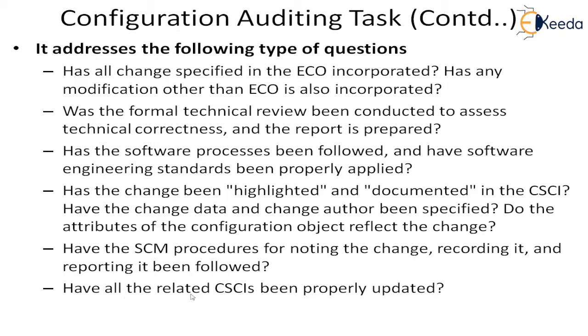And finally, have all the related SCIs, CSCI, that is computer software configuration items, been properly updated, whether, when they have been taken into the repository, it is correctly updated or not. So these are the kind of questions. If you can create a checklist like this, a questionnaire checklist, then you can say, yes, this has been done, this has been done, this has been correctly noted. Like that you can see. So all this kind of QA answers are being answered by this configuration auditing task.